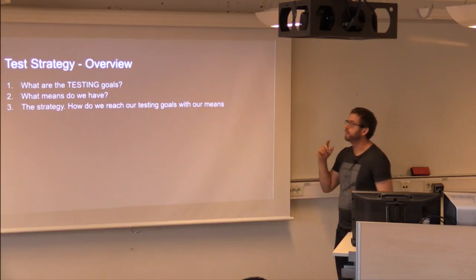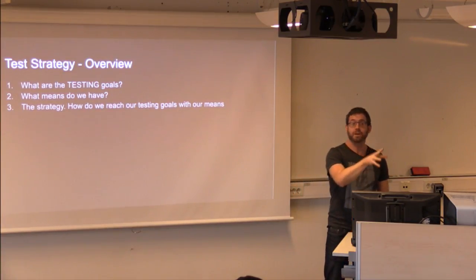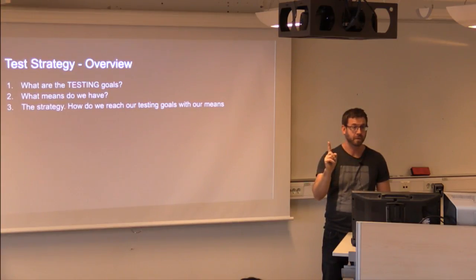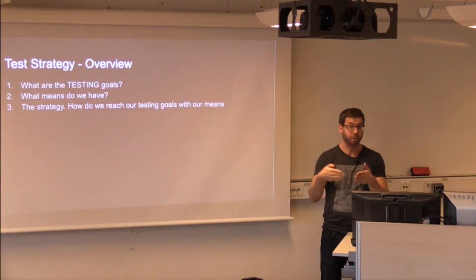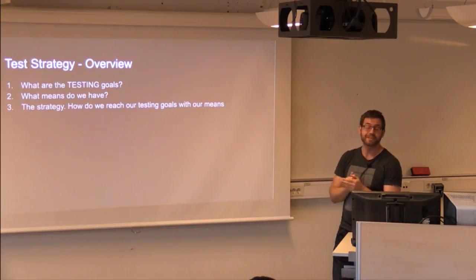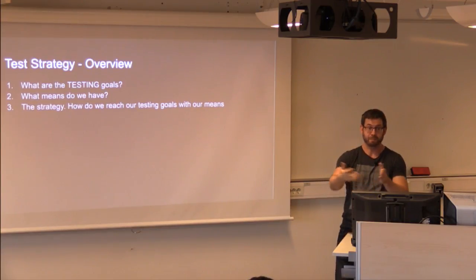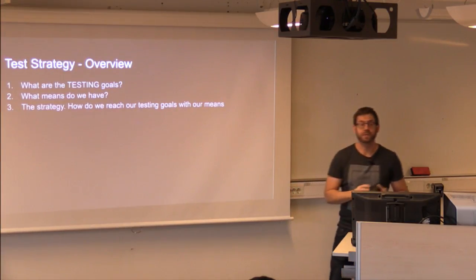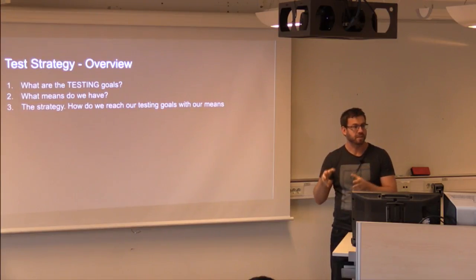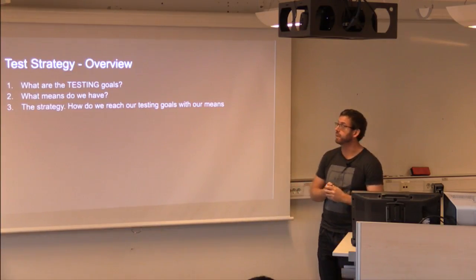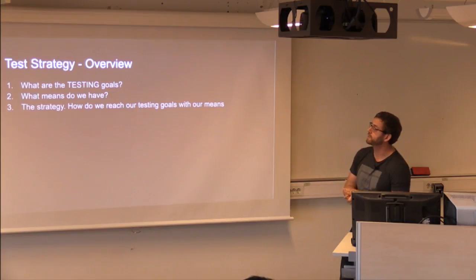Let's take an example from the requirements of assignment 2's software. It says that it's supposed to work in this and this operating system. And perhaps you only have one computer with one operating system. So that is a restriction of what you can do, and it should be clearly stated as a restriction. Perhaps we're not going to try all these other platforms because we cannot, because we don't have the equipment for it. And that is okay. And perhaps the number of students that do this assignment times the number of hours they have available is another restriction, right? It's another means that restricts this.